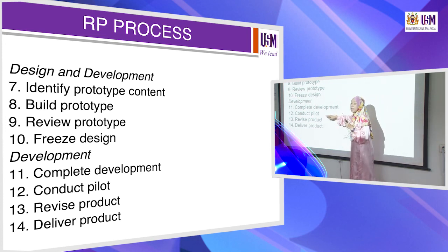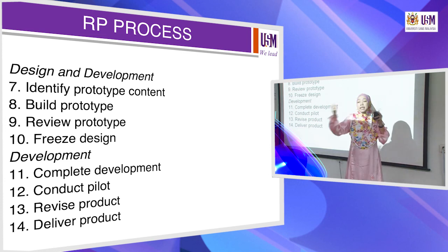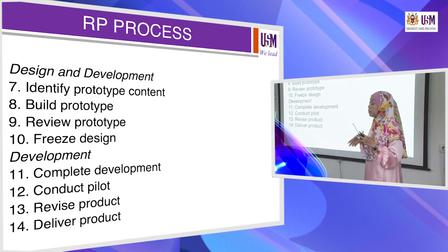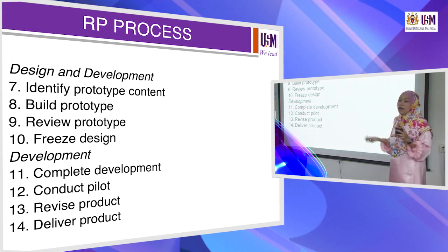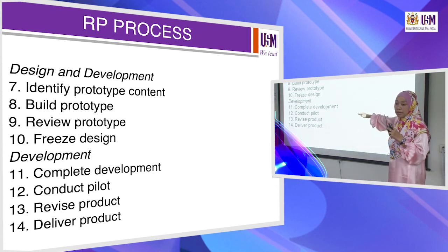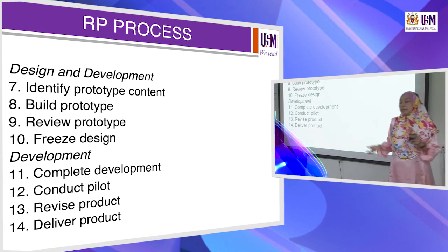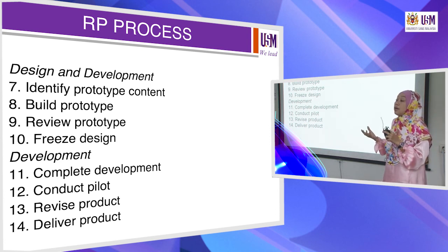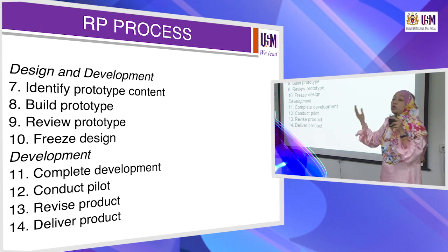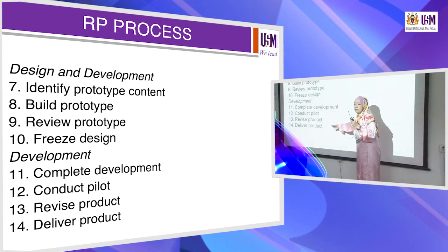Then conduct a pilot. Maybe we should do it, or we cannot. For example, we are going to do a very big seminar. Conduct pilot means that we are going to do a pre-seminar, or maybe a test of the opening ceremony, for example. We need to know what to do and so on, so we need to conduct the pilot first. And then revise. During our pilot test of the opening ceremony, what happened? Maybe the time is too short. We have provided too short a time, so we have to revise. And then finally the seminar, we deliver the product.